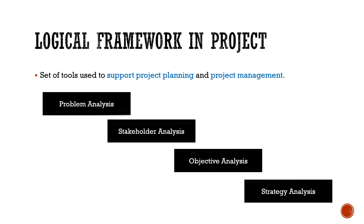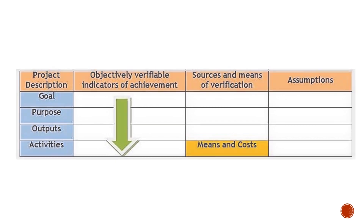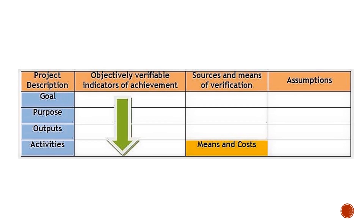This is a logical framework that reflects the overall project. We can see the logical framework as a simple template with only 4 rows and 4 columns. In the 4 columns, we have: first, project description; second, objectively verifiable indicators of achievement, or simply indicators; third, sources and means of verification; and fourth, assumptions and possible risks. In the first column's rows, we have goals, purpose, output, and activities.